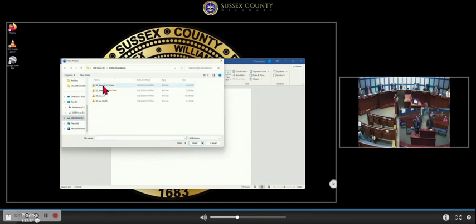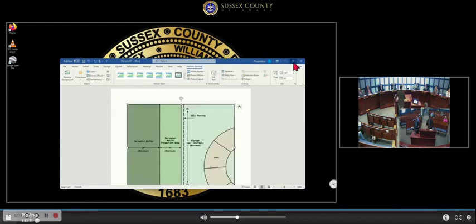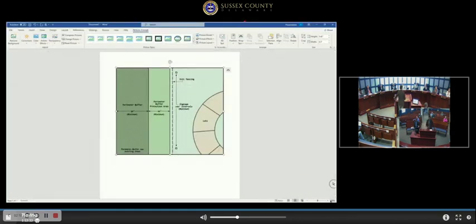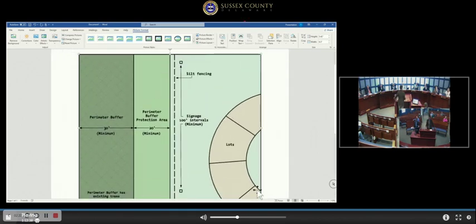So the trees will be planted before the first building permit in that phase. Then all the roads and stuff go in, the houses all get built. Then, when that's all done, they're going to come back to the county to get a substantial completion sign-off, and that might likely take a year or more just to get from point A to point B there, and then that starts the 2-year guarantee with the bonding that remains in place. So we'll get the trees in earlier, and they'll be protected longer, basically, through this ordinance. So, that's a general overview of it.